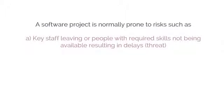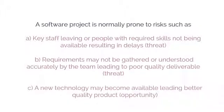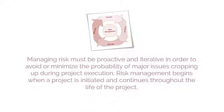For example, a software project is normally prone to risks such as key staff leaving or people with required skills not being available, resulting in delays — that's a threat. Requirements may not be gathered or understood accurately by the team, leading to poor quality deliverables — that's a threat. A new technology may become available, leading to a better quality product — that's called an opportunity.